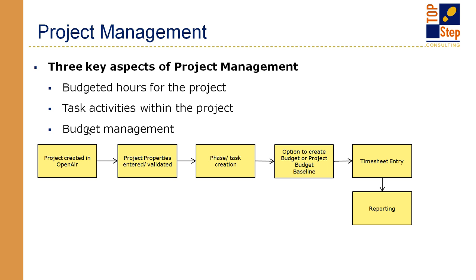After that is all done and your resources have been assigned, folks can enter time, of course, against the project. Typically, reporting starts after people have set up the project and entered time, because a lot of folks from a project management standpoint are looking at how that project is tracking. So you're doing a comparison of budget versus hours, whether that is cost to cost, whether that is hours to hours comparison, however your organization sees fit to manage. That's usually when reporting comes into play.